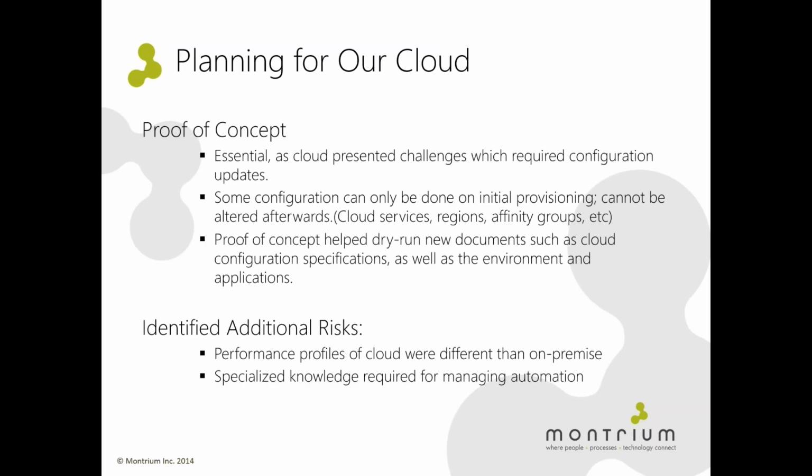So this led us to a very important stage, which was the proof of concept stage. Now, this was absolutely essential as the cloud presented challenges that required configuration updates and, quite frankly, to become more familiar with the cloud environment. So some configuration, although we think of the cloud as fully configurable, can only be done on the initial provisioning process and can't easily be altered afterwards.